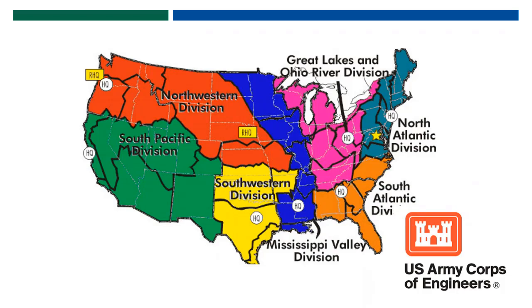I'll just tell you that working with the regulators at the U.S. Army Corps of Engineers every day, they have a job to do, and it is in part to confirm that our activities, that GDOT's activities, are in fact legal and authorized under the Clean Water Act. So 404 permits were created by the U.S. Army Corps of Engineers to allow for development of water resources or fill, et cetera, modification of water resources. And these permit authorizations are critical to GDOT's functioning. So when you think schedules, you've got to think permits. When you think project delivery, your permit can be your critical path.